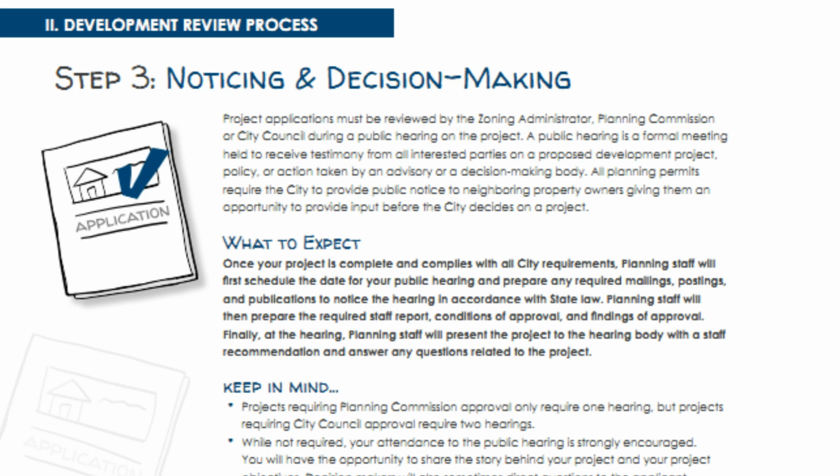Schedule and notice hearings. When a notice of a public hearing is required, the notice must be given at least 10 days before the hearing date. The notice will be published in the city's local newspaper, posted within the project site, and mailed to neighboring residents. Notice may also be given to the Milpitas Unified School District and any other local agencies that provide important facilities and services to the project.